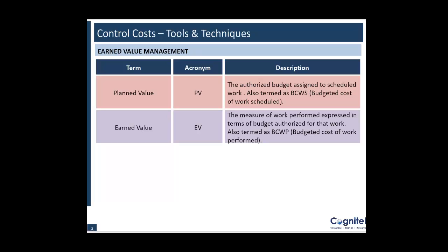So that means I am ahead in the game, because my planned value was one side to be completed, but in reality, since I completed wall 1 a little early, I also started painting wall 2 of my bedroom. So basically I have completed 50% of wall 2 also, right? So that would be the earned value. I hope it is clear what is planned value and what is earned value.